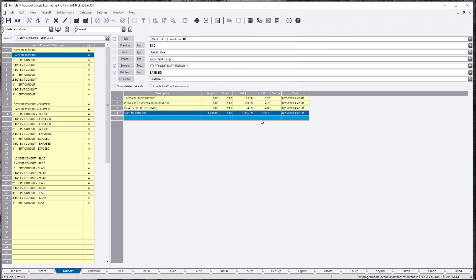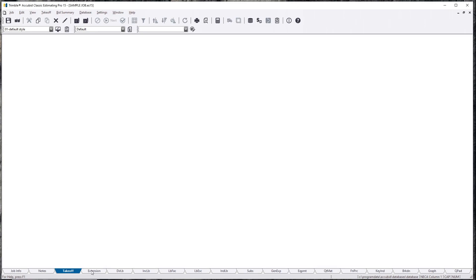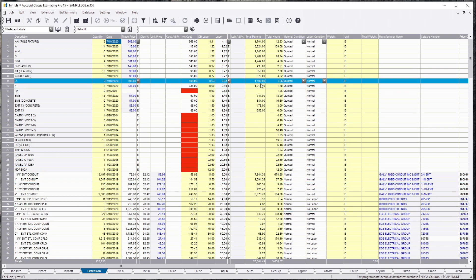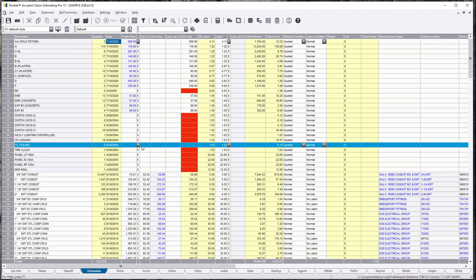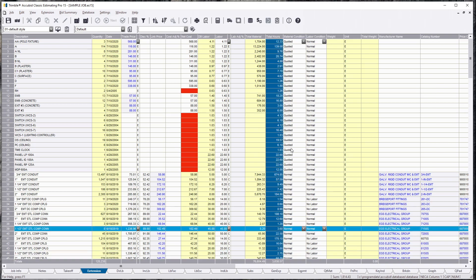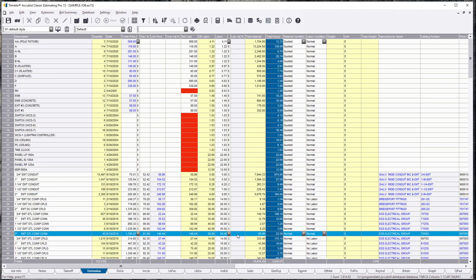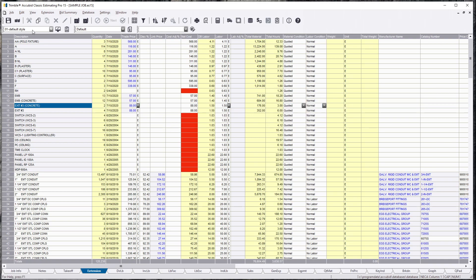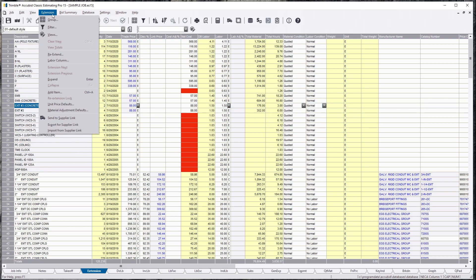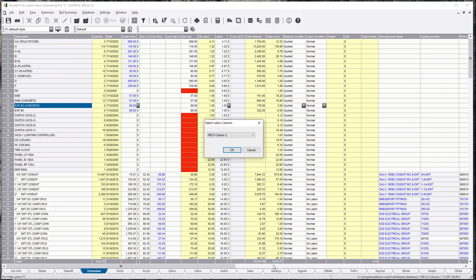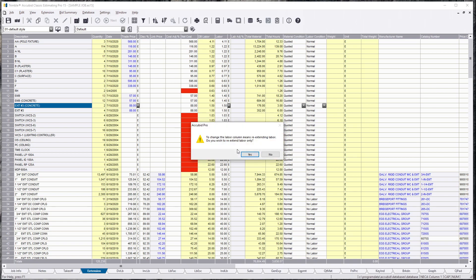It brings it back down to 168 hours. Right now I'm at NECA column 1, and let's say this job was a column 2. For demonstration purposes, I'm going to jump it to NECA column 2. Right now we have 3,638 hours. Let's go to extension labor column and we are going to do a column 2. I want you to see how much hours this jumps. You're going to want to re-extend everything.